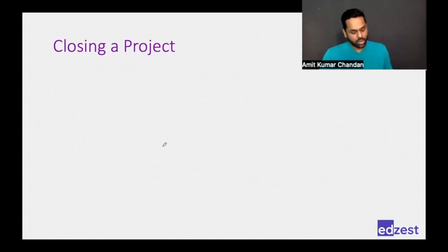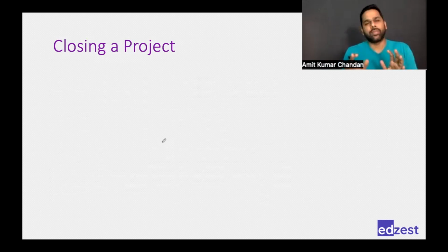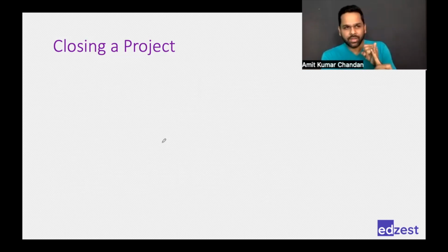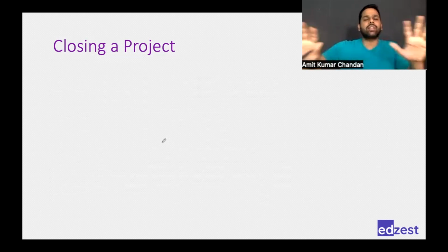So now, whenever we talk about closing a project, okay, it is very important to understand that closing a project means wrapping things up. Okay, we are not checking anything. We are not completing the work. Okay, we are closing means we are formally wrapping things up. Whatever has already been done, we are just consolidating it and ensuring that we get a sign off, we get a handover, we hand over it to operations team or whoever needs to have the handover and release the resources.